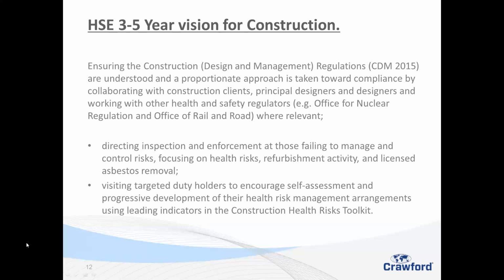I'd like to see the principal contractor provide a lot of the internal inspections and monitoring, such as ensuring PASMA trained people are covering the scaffolding, just for example, ladder inspections, etc. And also making sure that people are trained to use the PPE and are actually using it, and it's being maintained. These are the things I see on sites, and not just ours, many others that I've been around: you're going to see great PPE in the huts, but as soon as you go on site, there's things missing like hard hats, decent gloves, facial masks, and in this day and age of silica dust, we've got to be careful.